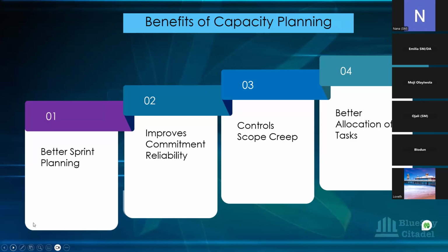You might have somebody that, every time we plan the capacity, takes all Fridays off, maybe because of childcare or one thing or the other. Looking at the capacity that you've planned over time, there's a pattern that you know. So if in your team you have a tech lead that assigns work, that tech lead knows that, when it comes to the sprints, Muji takes all Fridays off. That helps you to plan the kind of work that you give to them. So it gives you some kind of reliability.